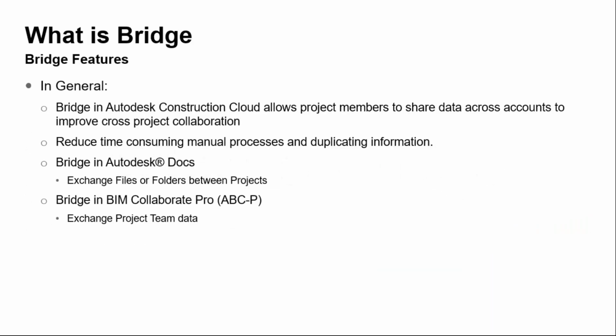So what is Bridge? Bridge is a tool that allows multiple projects to share data across projects without the need to have their files stored on someone else's cloud account or to manually exchange files for a project. The Bridge tool can be leveraged by those that only have access to Autodesk Docs, as well as those with BIM Collaborate Pro.